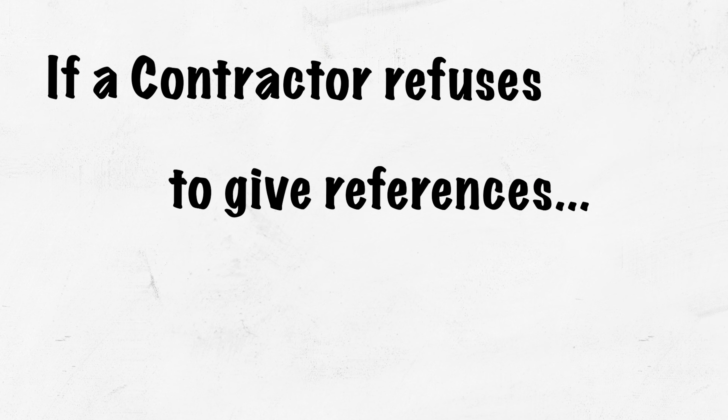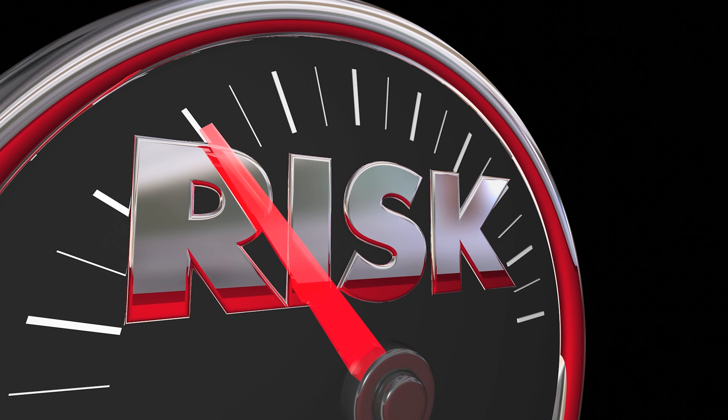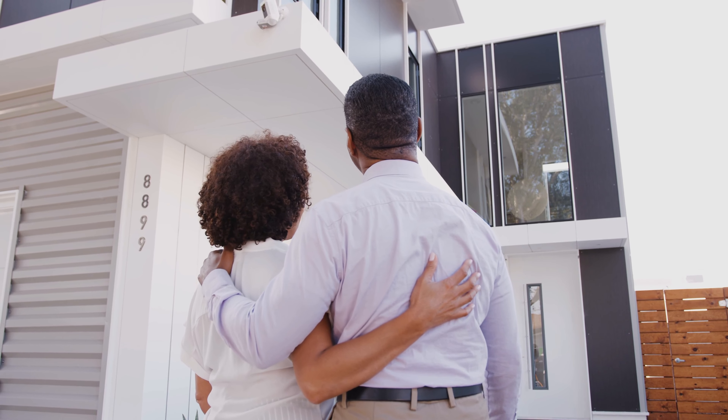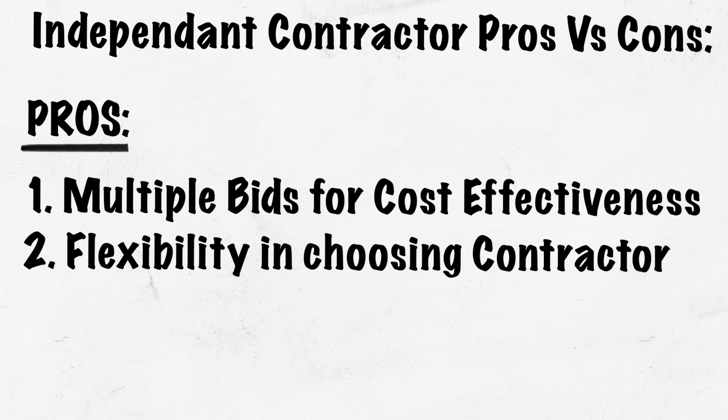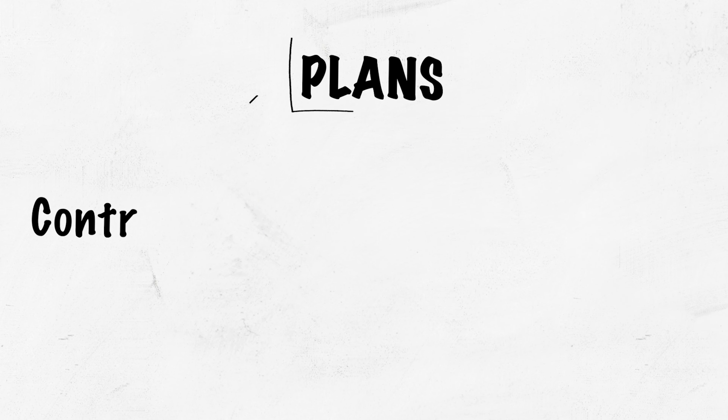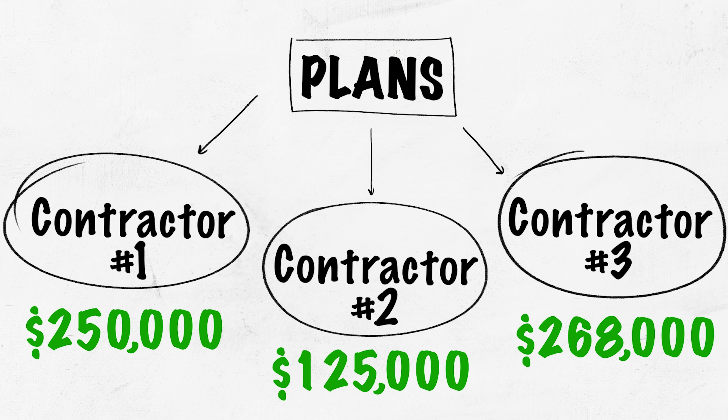As a contractor, I always had a list of my previous four or five projects. Those customers were happy to take a phone call from a prospective customer and allow them to come look at the work I performed. Being present within the work is different than pictures — you'll be able to get a feel of the finished product. When three contractors are bidding, the owner can compare the bids and see if there's a big difference, and if so, ask why — because they should be close.